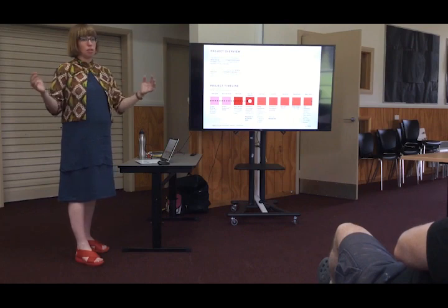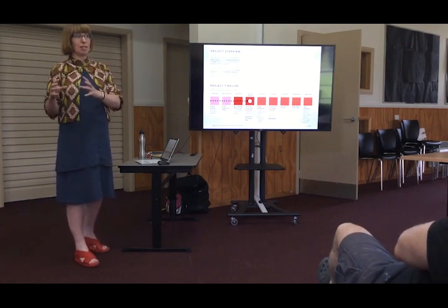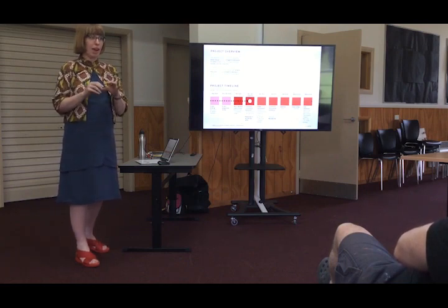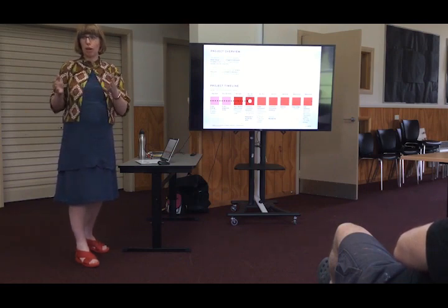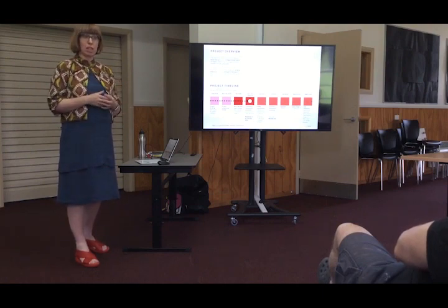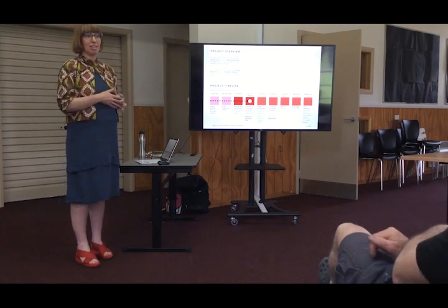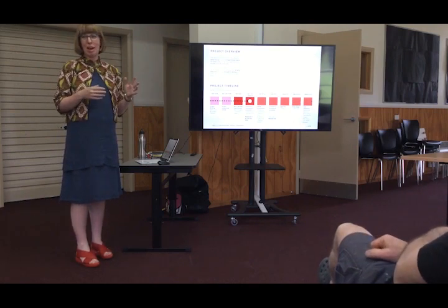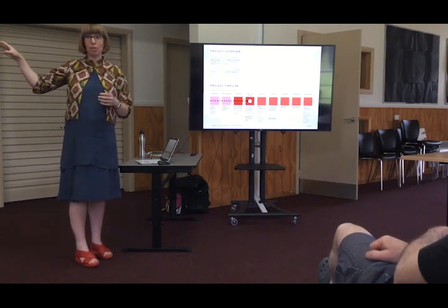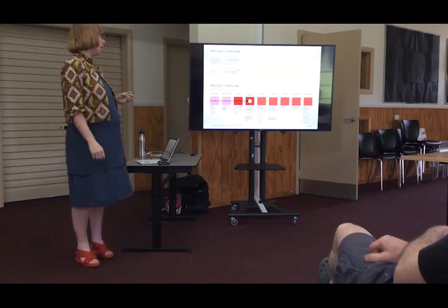Then I'll consolidate all that feedback and put it into a next iteration of the designs. That'll be looking more closely at how we can actually make things work with the right road widths and parking allowances and all that sort of thing. I've got a traffic engineer on board with my project as well, who'll come in to help make sure that we've got the right traffic flows, because that seems to be quite an issue between the town centre and down at Scrubbers End as well.